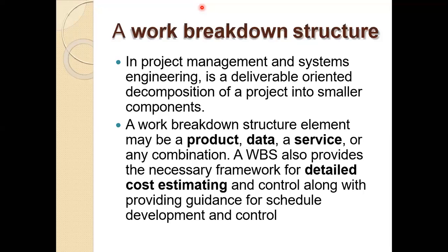And after 15 or 20 days, when you go for cross inspection, you check that for 15 days this task was allocated, and this task should be completed within these 15 days. When you reach the inspection point, if you find that foundation work is not yet completed in 15 days and still requires two to 3 more days, or if foundation work is 100% completed, then you can start the new task.